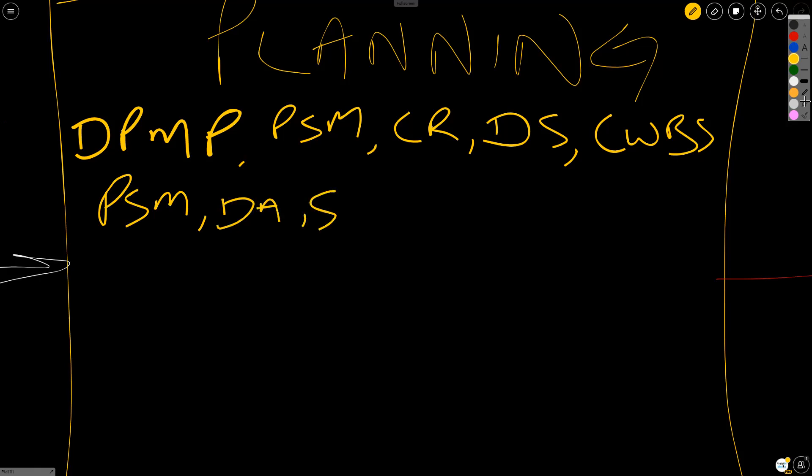We create the WBS. And then in scheduling, we plan schedule management. We define activities. We sequence activities. We estimate activity durations. And we develop the schedule.